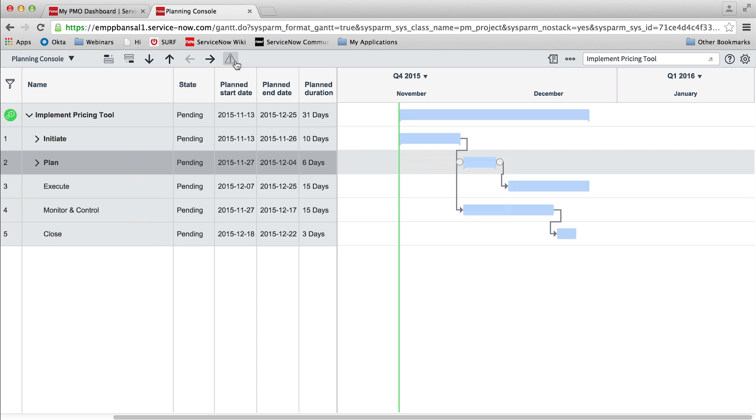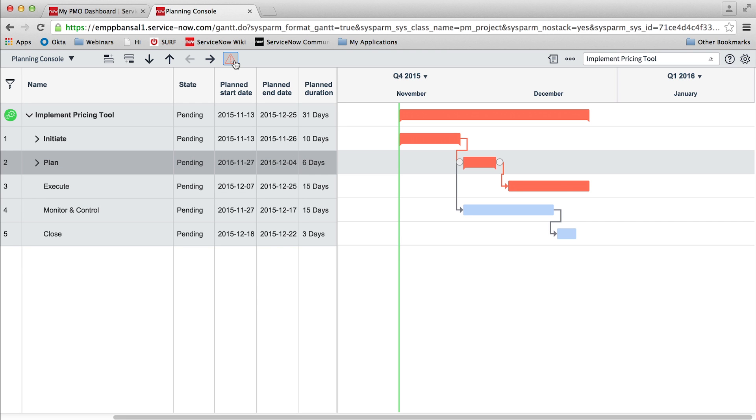The planning console also displays the critical path of the project. Tasks on the critical path are highlighted in red, which allows the project manager to track them closely.